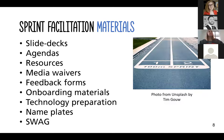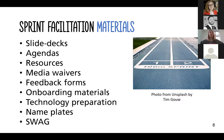Sprint facilitation materials — some things you might have to organize in advance include slide decks, agendas, resources, media waivers if you're taking pictures and wanting to tweet those, and feedback forms. If you have a weekend-long sprint, we've provided sprinters with feedback forms at the end of the first day to establish a benchmark of their thinking and tweak anything for the next day. You need to prepare any onboarding materials to send in advance, handle technology preparation, create nameplates for the sprint day, and organize any swag you want to provide sprinters with in advance.